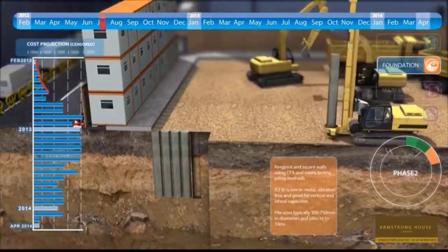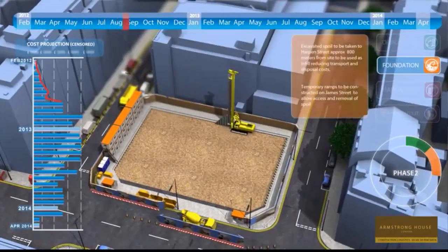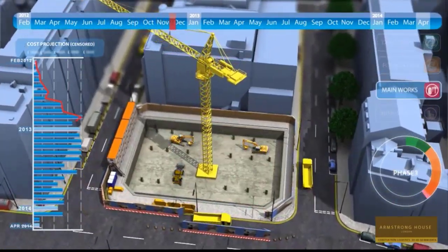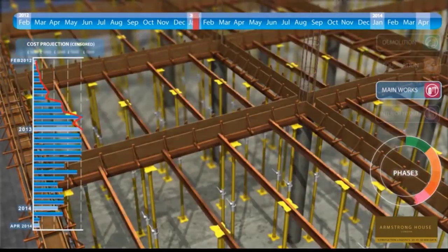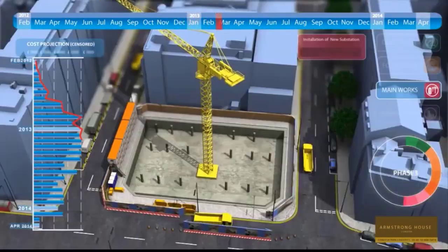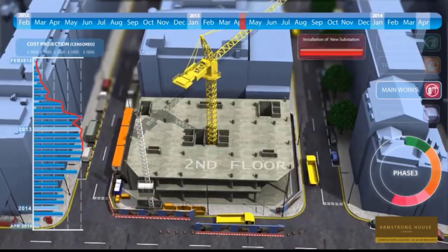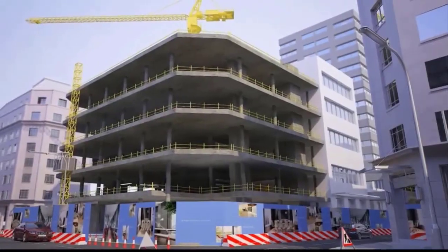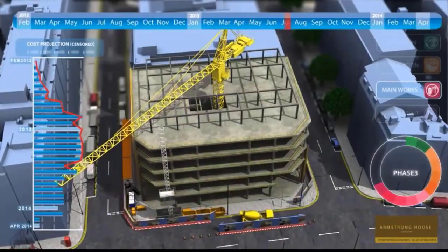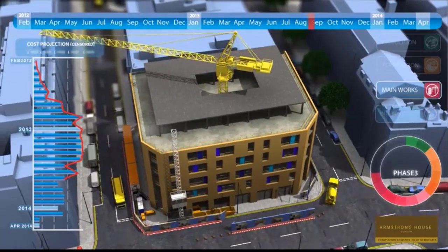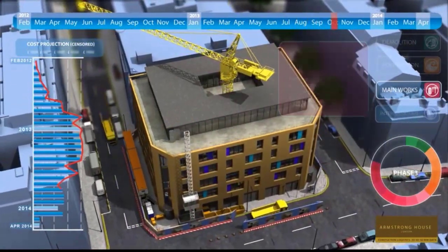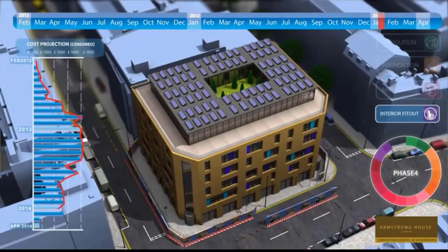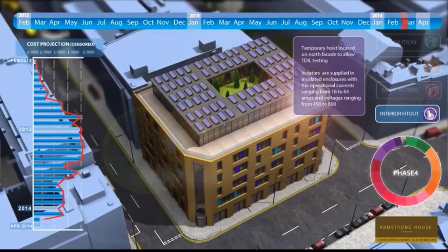Number 4. Planning and equipping the construction site. The schedule prepared is connected to the 3D model, and the predicted progress of the project is completely visualized in 3D. In this phase, using specialized software, construction site safety, material depot location, and equipment placement such as tower crane are simulated to make necessary and optimal decisions for project implementation.